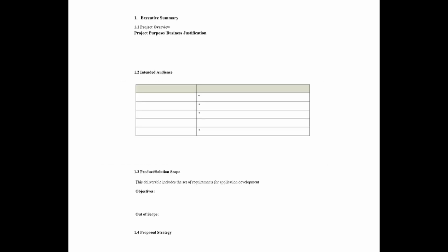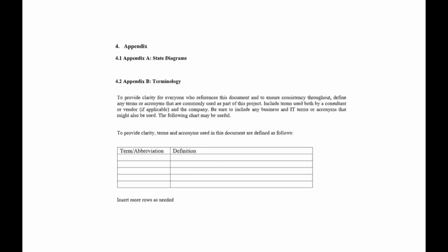Here will be documented the as-is and to-be business processes. As-is is the way the processes are currently, the way they are today, the current issues with the current processes, and will highlight why the changes are needed: repetitive manual processes, having redundant data, working in silos that result in increased costs and losing revenues. And to-be scenarios are the way the processes will be designed in the future.